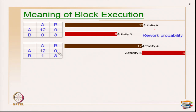Now I have activity A and activity B. Duration for A is 12, duration for B is 8, and I have given a rework probability of 1 here and 0 here. Since there is an X mark, activity A executes first, then activity B because there is a dependency relationship. After B, A never repeats because I gave 0. So the duration stops, and this shows A and B are dependent activities - this represents sequential execution.